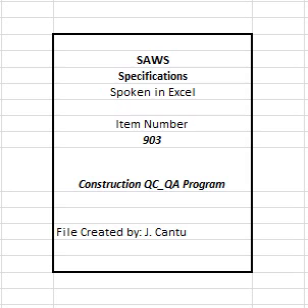E. Submittals. 1. Identify as appropriate, including but not limited to, all definitions, procedures, product data, shop drawings, samples, manufacturer's certificates/warranties, etc. 2. Prepare a schedule of specified submittals to be submitted for review/approval, verify all material and contract requirements. 3. Identify SAWS personnel, engineer, etc. responsible for the review and acceptance of project submittals. 4. Prepare a construction safety and health program, contractor and subcontractors, in accordance with SAWS Construction Safety and Health Program Guidance Document. 5. Testing laboratory services, to be used by contractor; submit data for review and approval of laboratory as specified in the contract documents.